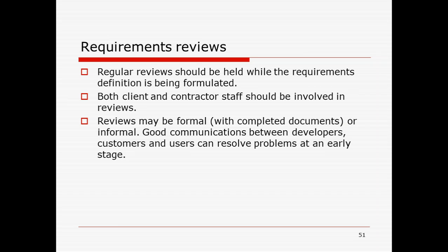Then comes the requirement review. After all the details of the system requirements have been gathered, the review can be conducted. Both the client and the contractor staff should be involved in the review process. That is, both the developer team members as well as the customer team members should sit together and review the requirements, to see whether they are correct or not. So that is also a particular validation technique.